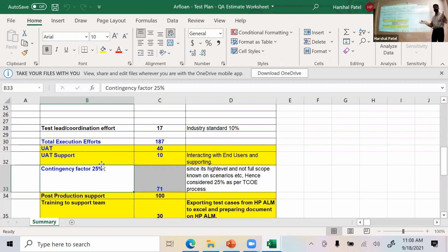You have to come up with an estimate of how many test cases you need to do. Right? And then you need to come up with the fact that, hey, I need to run this many test cases for testing this functionality as this user. For this functionality, I need this much. Because you will be reading requirements, right? And at that point, it says, hey, I need to test this, I need to test this, I need to test this. Right? And the more experience you have, the easier it gets for you to say, hey, I'm going to scan the requirements document quickly and then give you an estimate.